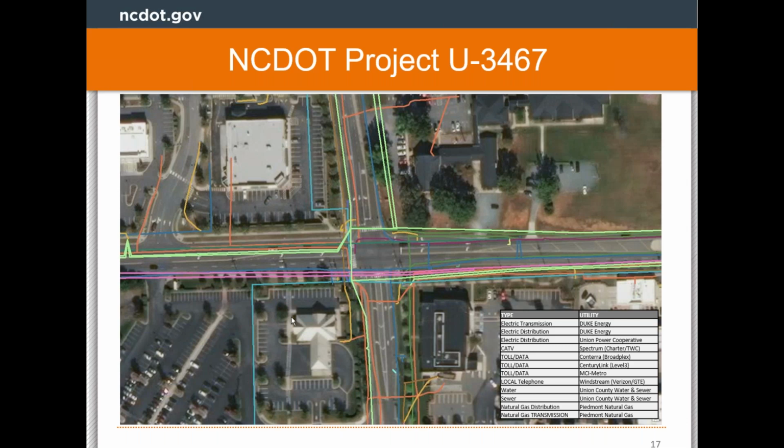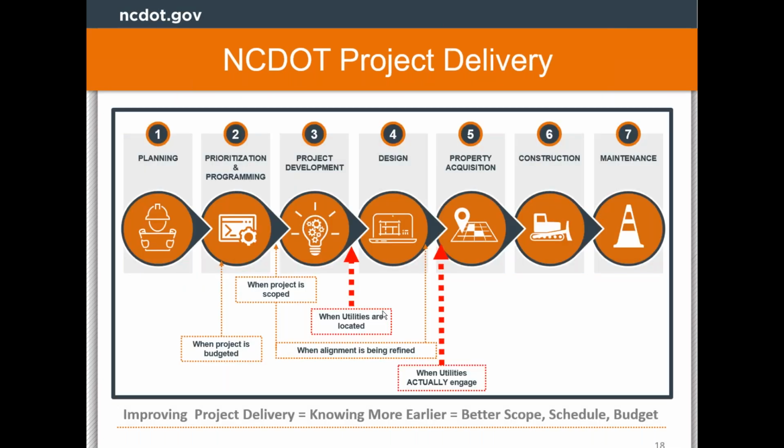And so if a utility coordinator is apprised earlier on in the process of the people he is supposed to be contacting, he can establish working relationships earlier in the process so that he can, in fact, gain their trust and help them to understand the project is moving forward and it's going to occur in the following manner. And that way, utility companies can agree earlier in the process to start the paperwork to move their utilities. And that way, that process won't be hung up on the realm of months and years.